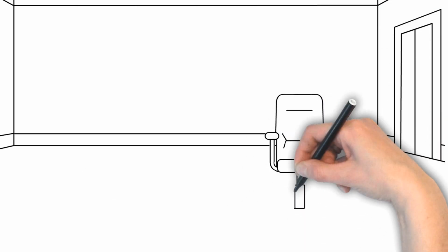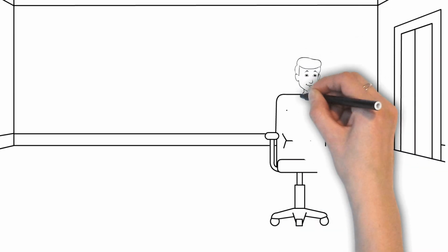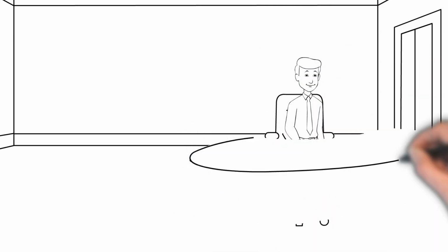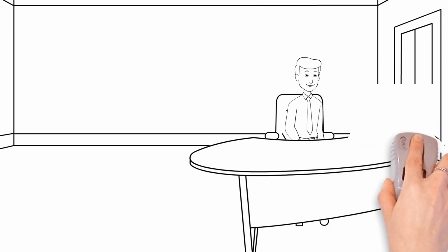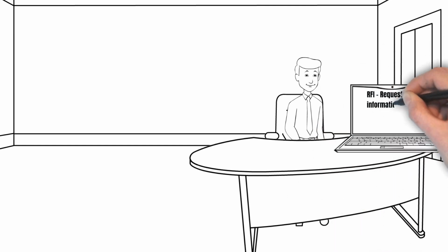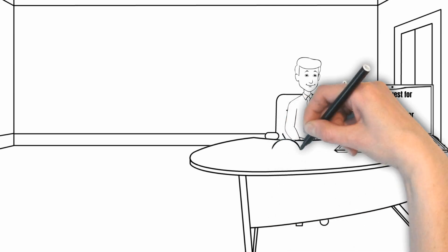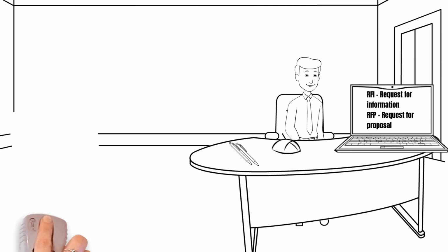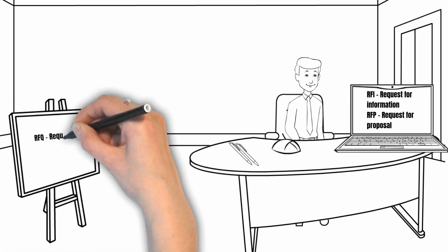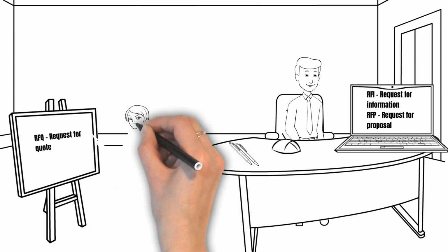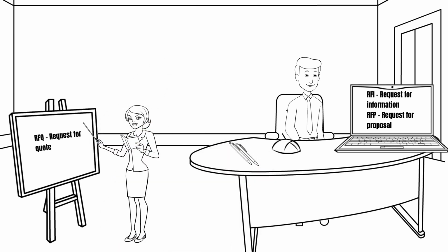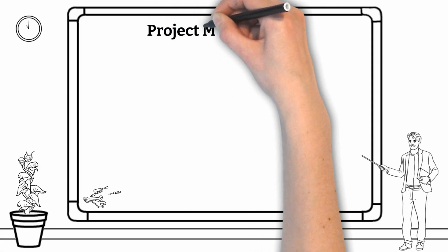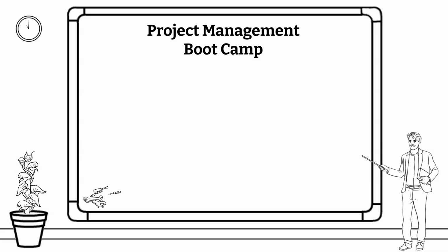Sometimes your project has a large portion of the scope for which there are vendors with the experience or products to implement it. The project is still an organizational project, but a suitable vendor is needed to design and implement the project scope. This is where more sophisticated procurement methods are used, like request for information, RFI, or request for quote, RFQ, or request for proposal, RFP. There are a few other methods of engaging with a number of vendors to pick the right one to acquire for the project. Much like with acquiring human resources, there is a whole host of knowledge of these in the